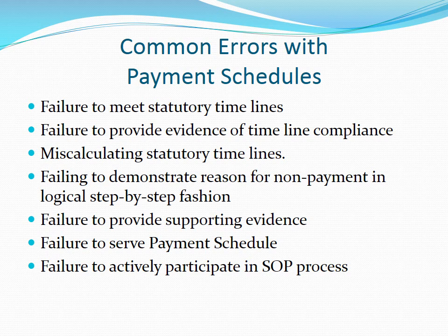Some common errors with payment schedules: again, failing to meet statutory timelines, such as the time you have to have the payment schedule served on the builder, failure to provide evidence of timeline compliance, miscalculating statutory timelines, failing to demonstrate a reason for non-payment in a logical step-by-step fashion, failure to provide supporting evidence, failure to serve a payment schedule, failure to actively participate in the security of payment process.